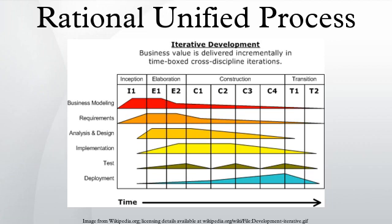After these are completed, the project is checked against the following criteria: stakeholder concurrence on scope definition and cost/schedule estimates; requirements understanding as evidenced by the fidelity of the primary use cases; credibility of cost/schedule estimates, priorities, risks, and development process; depth and breadth of any architectural prototype developed; and establishing a baseline to compare actual versus planned expenditures. If the project does not pass this lifecycle objective milestone, it can be cancelled or repeated after being redesigned.